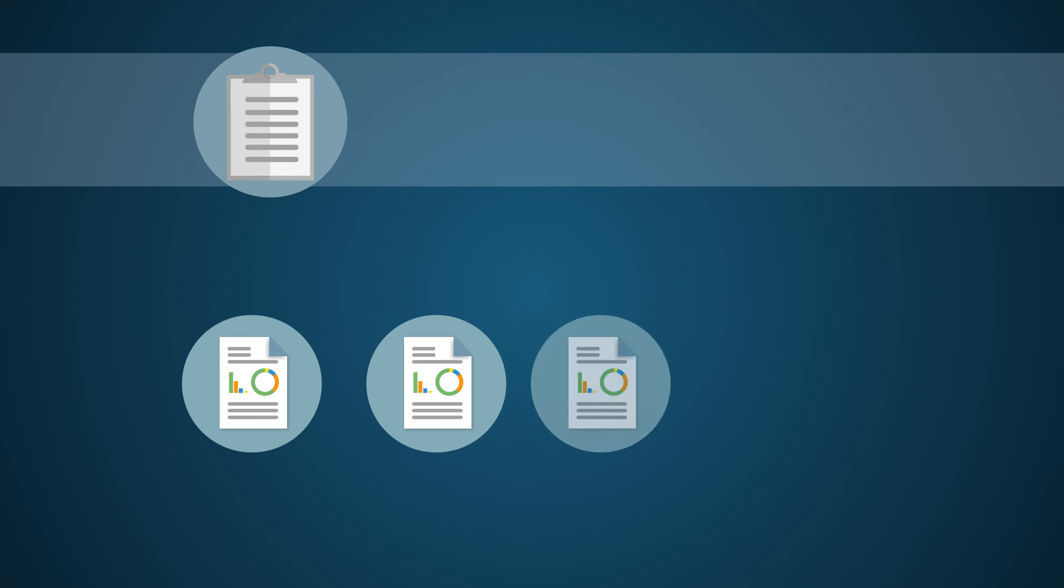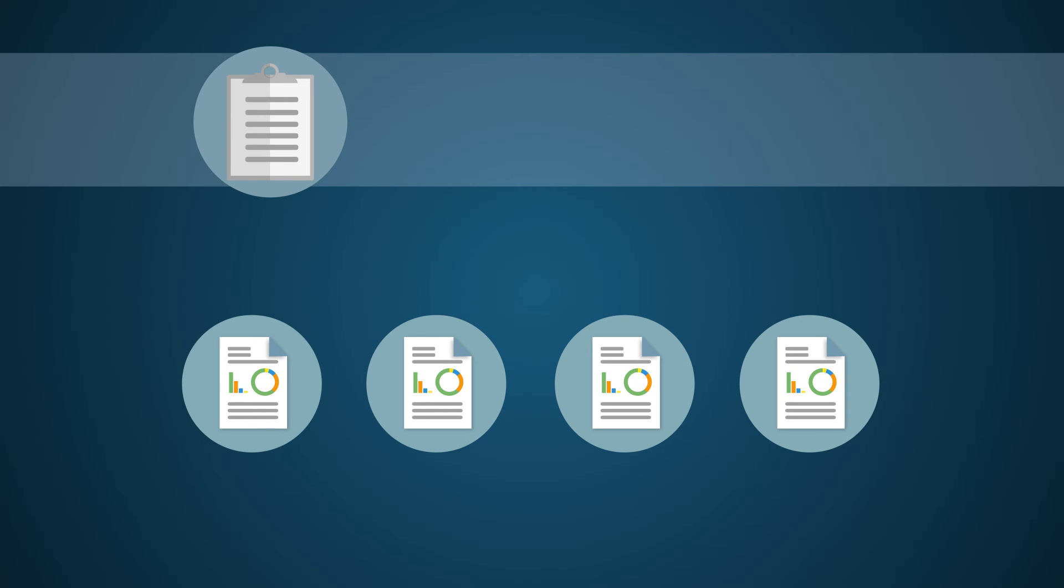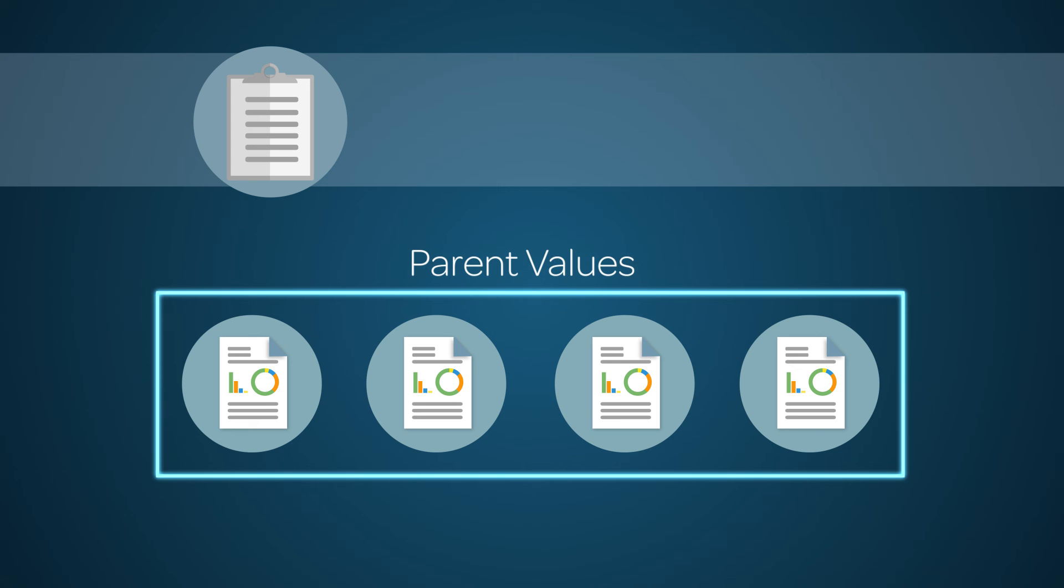These calculations and values within the project are child properties that roll up to the applicable Program and Portfolio parent values.